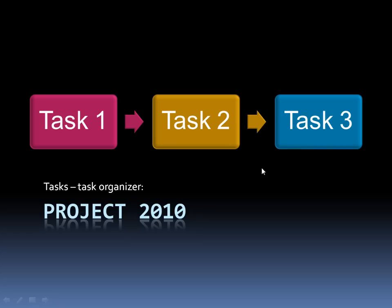Now these tasks are linked up in a relationship, meaning, for example, I cannot start task 2 until its predecessor task 1 has been completed. This will make sense in the project here because if I haven't researched anything in task 1, then I have nothing to write about in task 2.